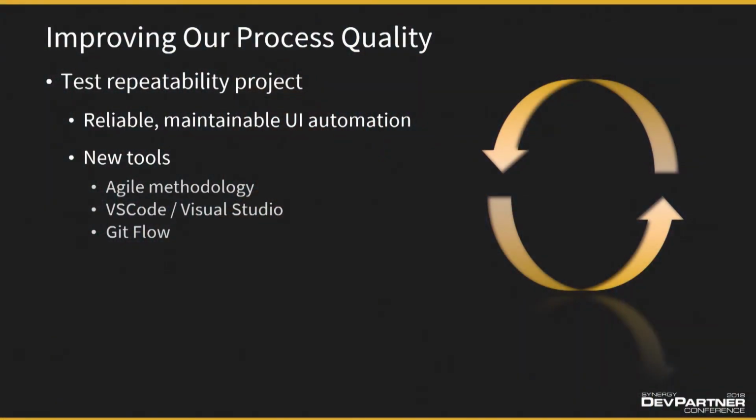We have also used this as an opportunity to begin practicing more of the modern Agile practices. We have incorporated iterative work increments as sprints into our project management. We use 2-week sprints. We are using Agile estimation methods such as user stories, story points, and velocity to plan our workload and provide estimates for delivery.